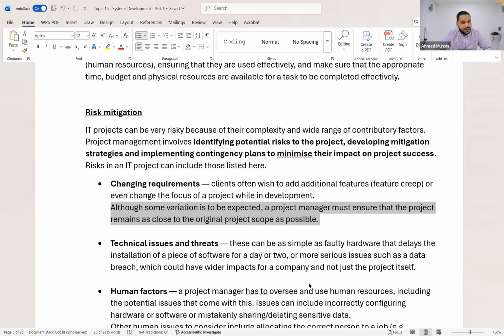You get it? So normally what do project managers do? They break it into small stages. Is it clear? So they'll say, you know what, we're only going to charge you for this tiny stage. We're going to develop this tiny change and charge you. And then from that point, after we are done with this, we'll see what your requirements are and then charge you based on the next stage.